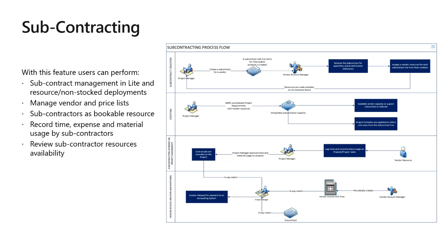Clearly, in either a light or a resource non-stock scenario, you have been able to work with subcontract resources in the sense that you could create a user for a subcontractor and have them log into your project operations to record their time and material and expenses and so on the project, and treat them like any other resource.